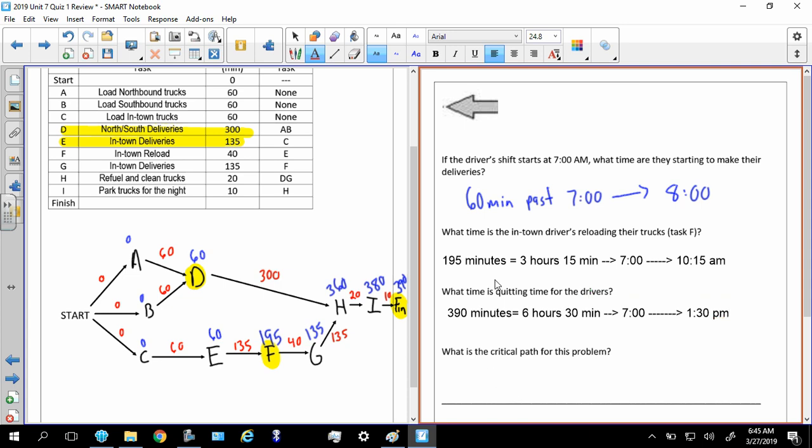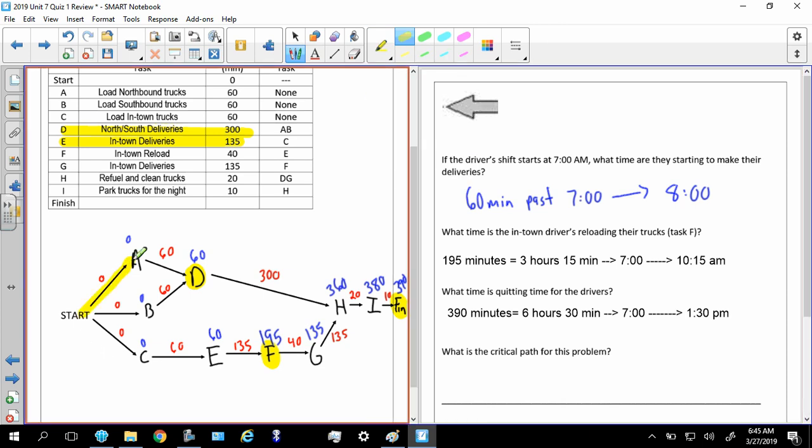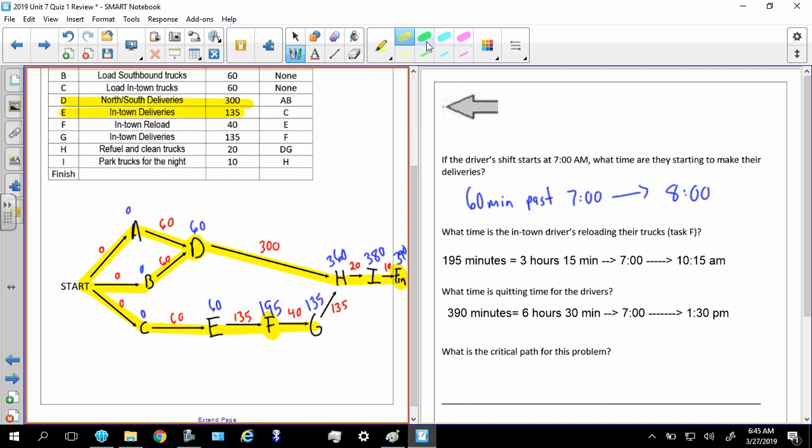All right, so what is a critical path? Let's highlight here. I'm going to do this in yellow. There we go. Notice that we have a tie here. It's okay, you can do a tie. E became through 60, through there, through there, and then boom. You might be saying, wait a minute, Coach, we have a tie. What happened? Because it didn't split here. If that's the case, you actually have two critical paths.